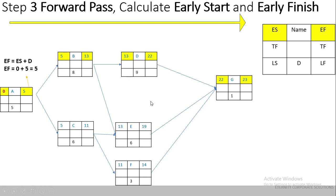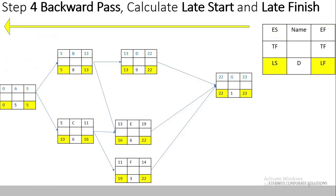To calculate the early start of successor activities, the rule is: Early Start of successor = Early Finish of predecessor. For Activity B, its predecessor is Activity A with early finish of 5, so we replicate 5 into the early start of Activity B. Using this method we calculate all the early start and early finish values in the network diagram, as shown by the arrows. Step 3 is done.